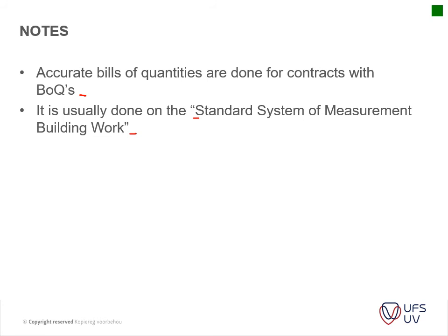If, for instance, I say excavations of your strip footing, does it include carting away of the excess material that's not going to be used again, or is the material just spread over the site? What do you do with that excess material?